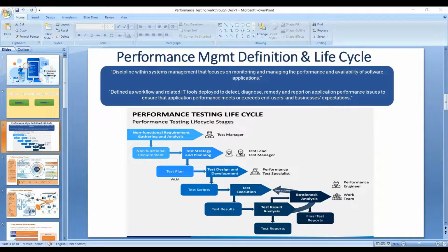So if that is possible, then we say okay fine ma'am, we can go ahead and do it. If not, we have to tell them that it requires a little bit more effort. So you'll be billed extra, and if the client agrees with that, then we go ahead and do that as well. If not, we have to leave it right there.